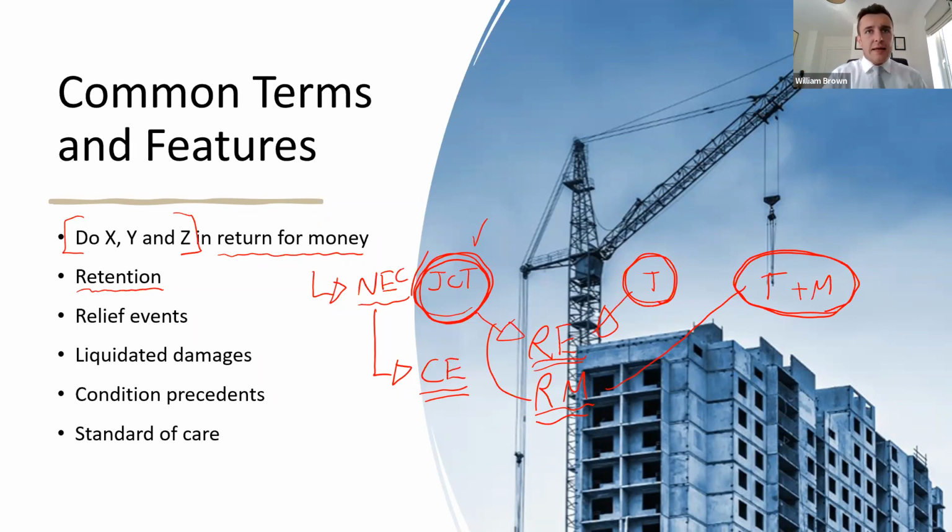If a delay in a decision is increased by weather, again, you'd be into a matter of concurrent delay there, which is a separate topic in its own right, trust me. But the chances are you would only get the time associated with that. The answer to that question might actually differ depending on whether or not you are in Scotland or in England and Wales or Northern Ireland, because the law of concurrency is actually quite complicated, Thomas.